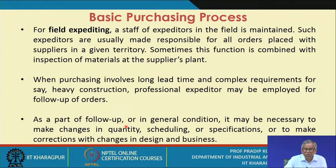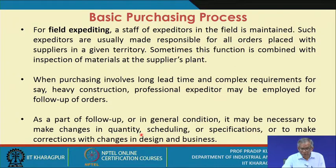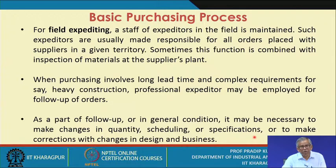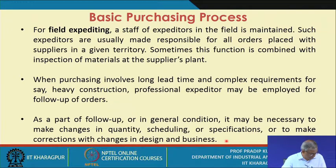As part of follow-up, it may be necessary to make changes in quantity, scheduling, or specification. This concept is essentially known as a change order. If there is a change order situation, you must consider to what extent it may affect your follow-up actions or field expediting. Many times you need to make corrections with changes in design, and the corrections in the purchase order have implications on the follow-up that you should be aware of.